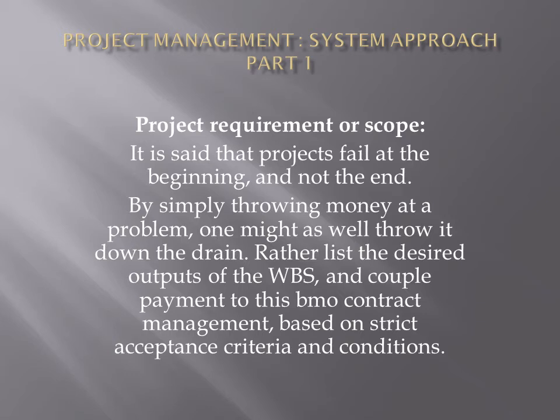Project requirement or scope. It is said that projects fail at the beginning and not the end. By simply throwing money at a problem, one might as well throw it down the drain. Rather list the desired outputs of a project and couple payment to this by means of contract management, based on strict acceptance criteria and conditions.